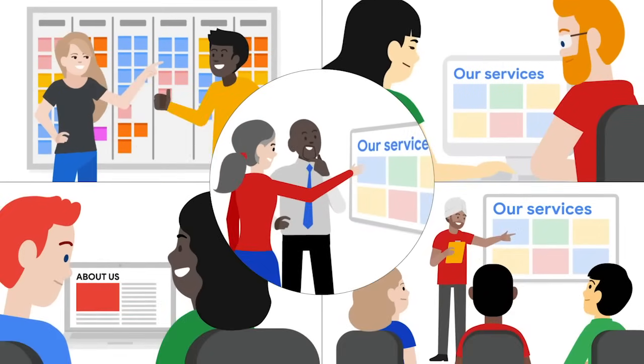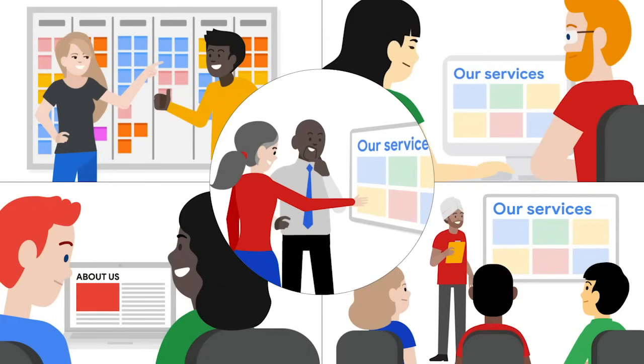An example of a project that would work well with an Agile approach might be building a website. Your team would build the different parts of the website in sprints and deliver each part to the client as they are built. This way, the website can be launched with some parts, say the main homepage, that are complete and ready for public view, while other parts, maybe the company blog or the ability to book online appointments, continue to get built out over time. This allows the team to get feedback early on about what works and what doesn't, make adjustments along the way, and reduce wasted efforts. In this same website example, the Waterfall method will plan for and require the whole website to be complete before it can launch.